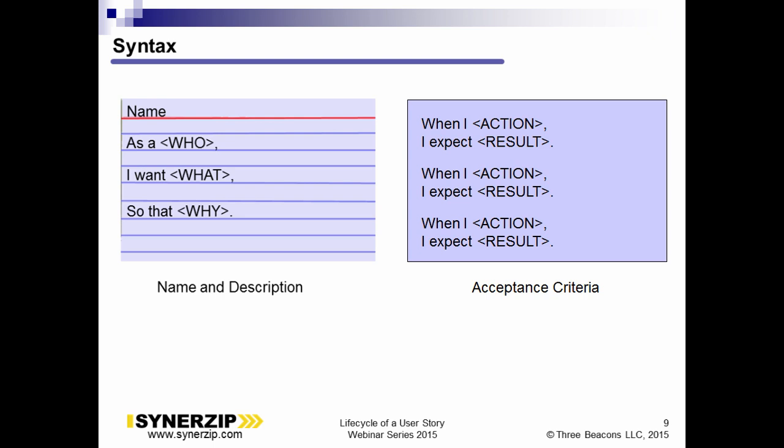Who writes the acceptance tests? It's not one person writing the front of the card and only QA writing the back — it's a team collaborative discussion. Whoever's writing the user story owns the responsibility of taking the first stab at the acceptance criteria. It's always a good idea to get the QA person to review the acceptance criteria, because these folks think differently and will find important things you may have neglected.